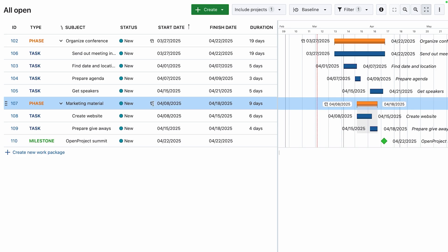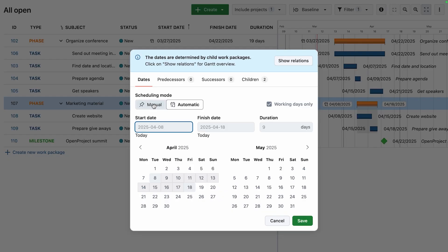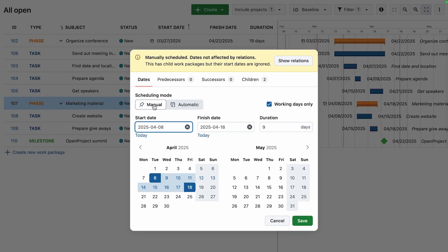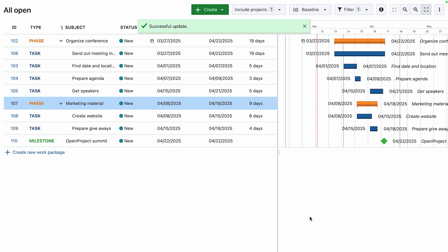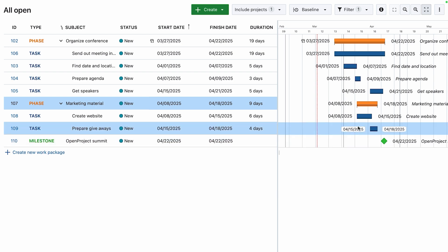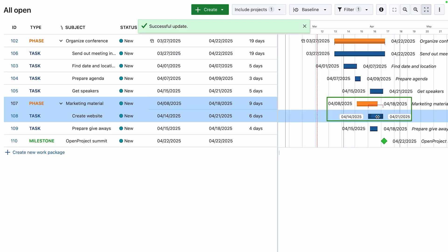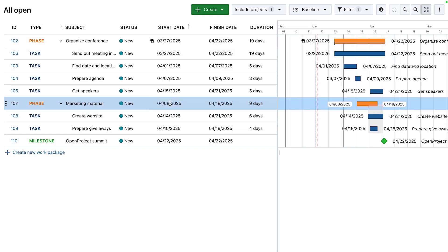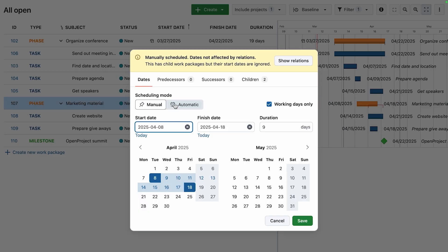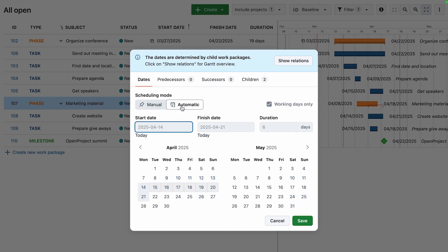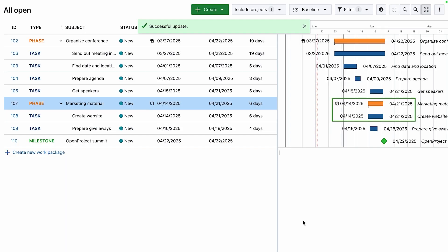Automatic scheduling mode is now available. This feature simplifies dependency and timeline management by automatically adjusting work package dates based on their relations. When you change the date of a related work package, all dependent dates update accordingly.